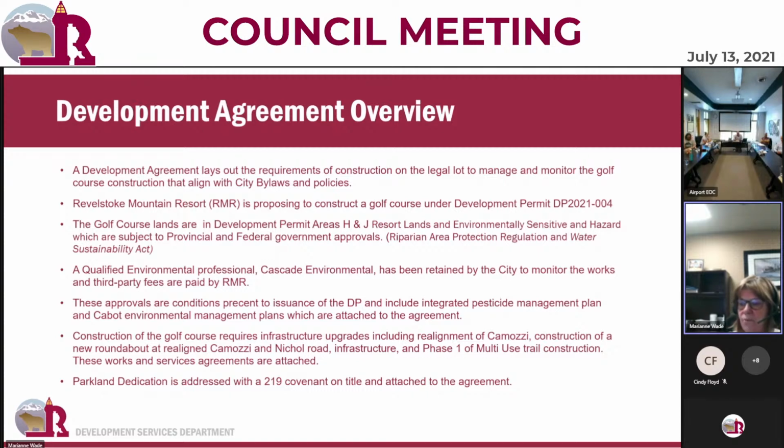In addition, we have parkland dedication, which is triggered through subdivision. We have a running Section 219 on the lands that will calculate what we need for parkland. And when that commitment is met by RMR, we did that with the phase 1. For the initial phase, that was a remnant of this requirement from historic subdivisions. And now we'll have a running table for parkland dedication as we move through development to make sure that the 5% under the LGA is met.